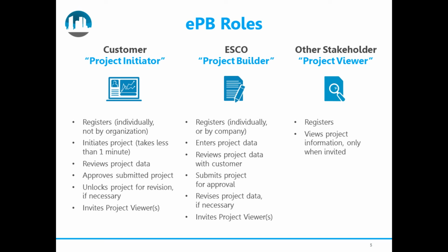Once the customer approves the project, it's locked for editing or changes. Actually, once the ESCO submits a project, it's locked for changes. If a project needs to be modified, the customer then unlocks it, which then sends the ball back to the court of the ESCO, who can then modify the data or upload a new replacement template. And like the customer, the ESCO can invite these third-party folks who have to have an account on eProject Builder first, but then they can add them as project viewers to their projects.